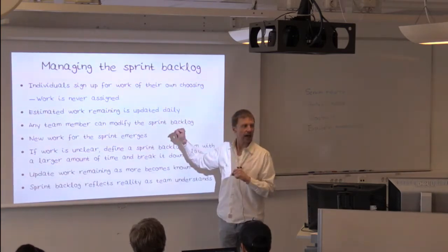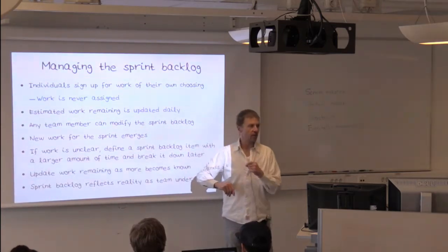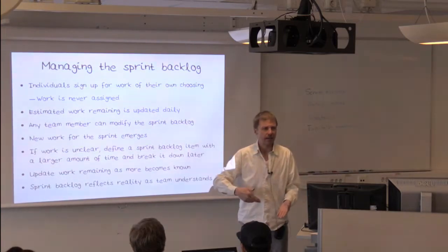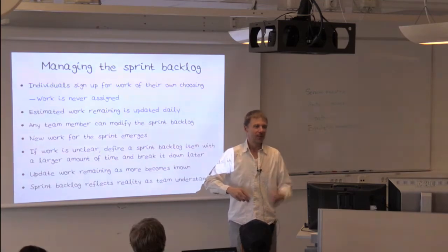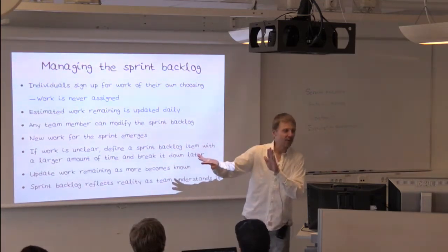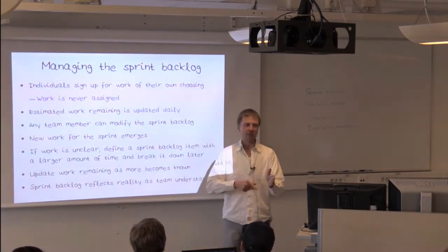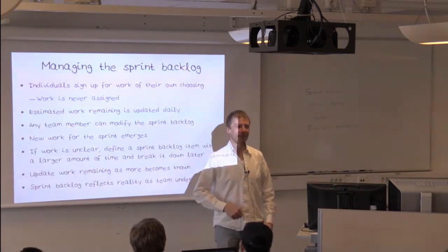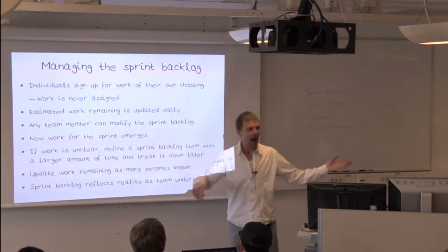If you worked on a task, it's not finished. Update the number of hours left that you think, and don't sandbag it. Don't write 8 hours if you think it's 4, because it will only mess up the planning for the future, right? Nobody cares if you put in 8 hours when you think it's 4, and then you finish in 4 hours, and you pat yourself on the back and say, I did it in half the time. Well, nobody gives a shit. Really, it depends on how much is left, right? It's done.